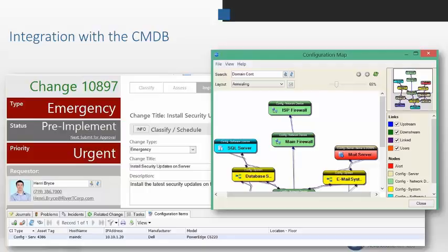It might be a way that you tweak your change management, because you'll have to manually put in information about your configuration items and so on and so forth. But once you've got your change management in place and you have the resources for config, you definitely want to grow that out, because configuration management will definitely help facilitate your risk calculations and your understanding of how you're impacting services.